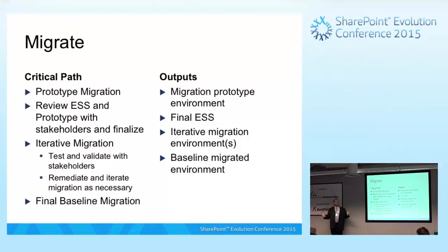They had about 1.5 terabytes in an intranet web application that we were pulling over. Actually, we were pulling 3 and merging them into one intranet because they had 3 different intranets. An example of governance if I've ever seen one. And we consolidated that, migrated it over, and it took about 6 days for the migration process to run.